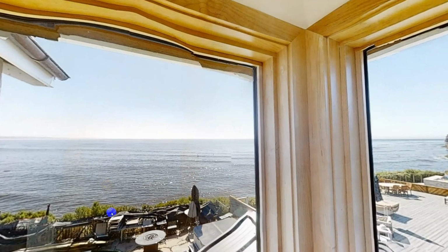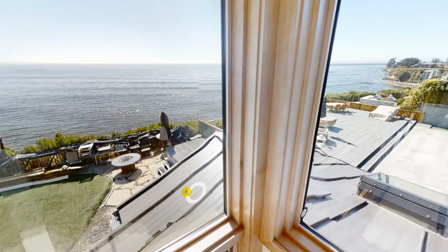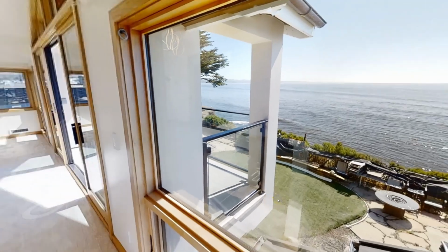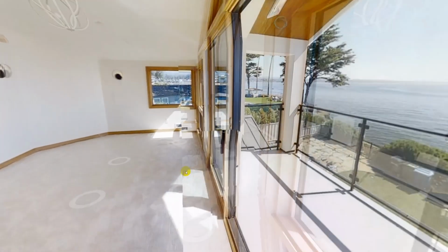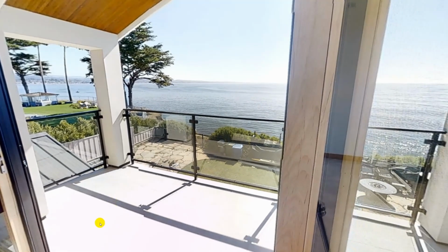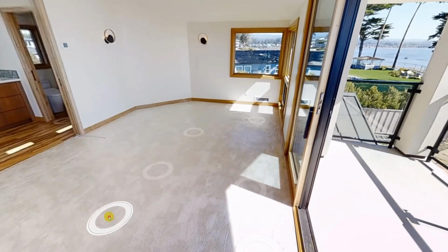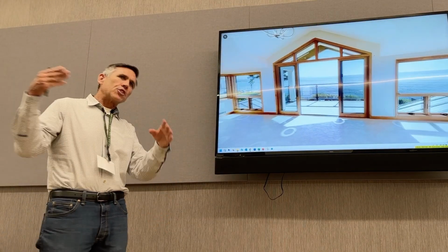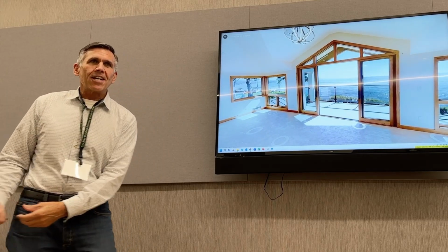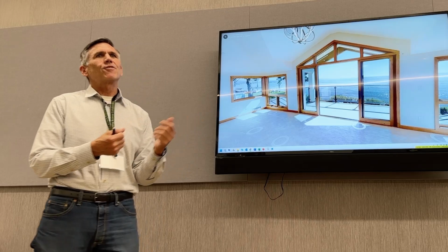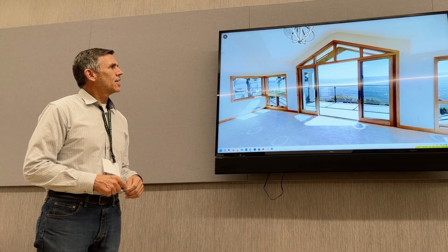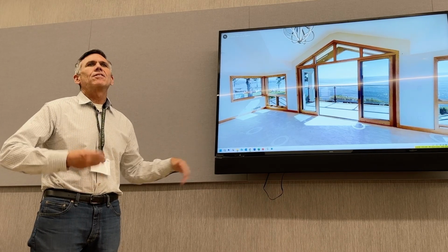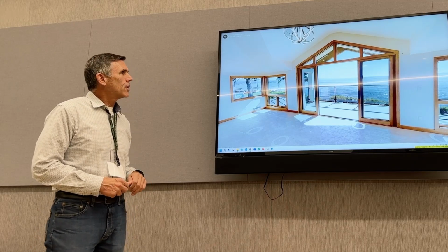Okay, that's it. You mentioned that this was about an 18-month timeline. If you had the opportunity to rebuild it from the ground up, how long do you think the timeline would have been? Well, I think something like this would be done in 12 months. You have to do Coastal Commission. I mean, not including design, just the build. It would have been much easier because all the stuff we're doing, we're in a hole, we're on our back, sliding, ten guys with a beam, dragging it across the floor, lifting that set. It was not easy. And then it also wasn't easy because things kept getting added all the time, which made it very difficult as well.